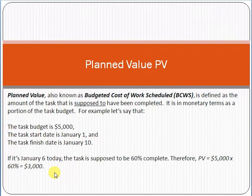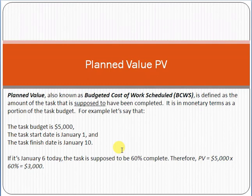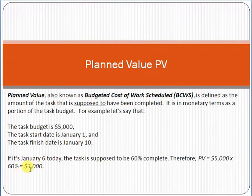How did we calculate the planned value? The formula is: Planned Value (PV) = Budget × Percentage of Planned Work. The budget is $5,000, the start date is January 1st, the end date is January 10th, and today is January 6th, so 60% of work should be planned complete. Multiplying $5,000 by 60% gives us $3,000 — that is the planned value. Thank you for your time, I hope you liked this video.